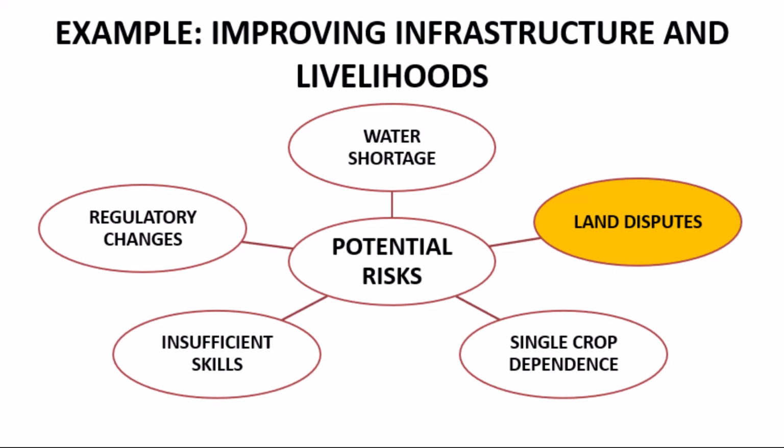There would be potential disruption to infrastructure development and community cohesion. Our assessment then is that the community development project should also involve land use planning. This combination of a moderate likelihood and high impact puts this risk in the high priority quadrant. Qualitative assessments involving community consultations and historical land use data can inform our strategies to address these land ownership disputes.